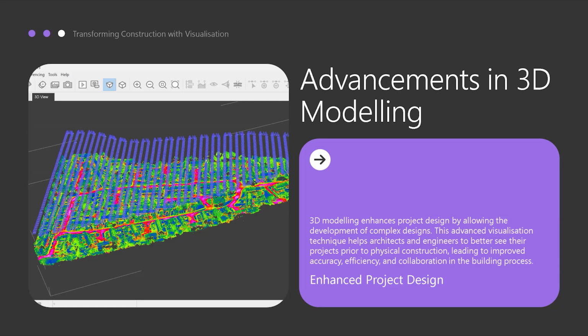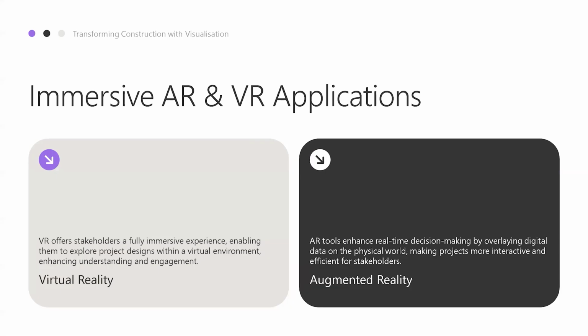But with the LiDAR and things like that, obviously if we're doing a site and we want to map, say we're doing a stock check and they want to know how many bricks they've got, we can put it all together, put it through some different software, and then it will give us the complete number of bricks, sort of how much is in a mound heap and at different elevations, so we can measure it all. So it's pretty good stuff.